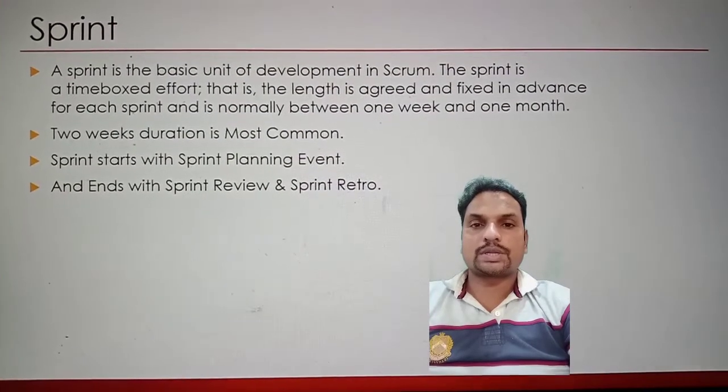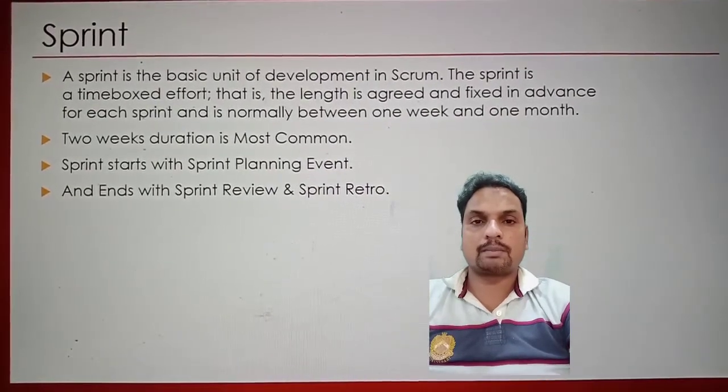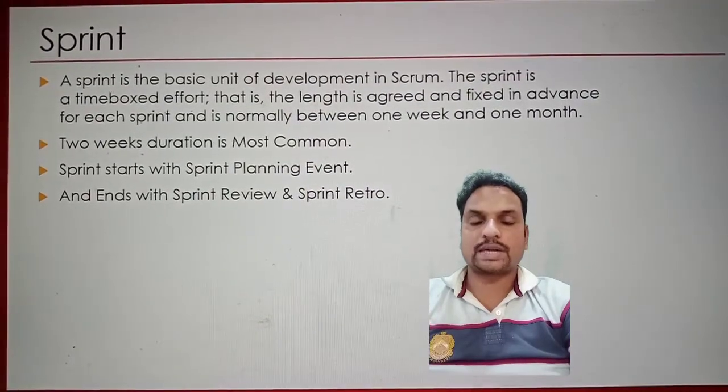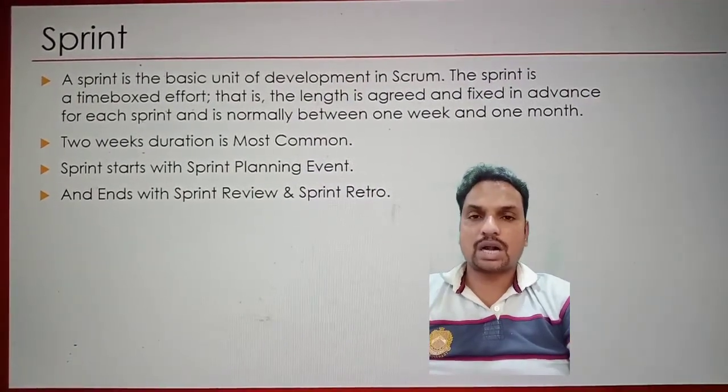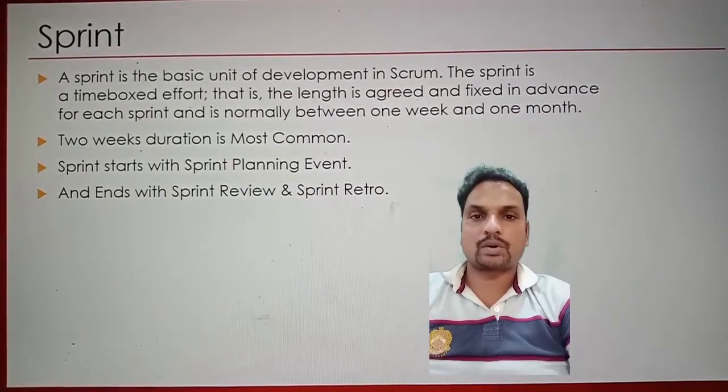The next important question is, what is a sprint? A sprint is the basic unit of development in Scrum. It is time-boxed between 1 week and 4 weeks, that is 1 month, and it starts with sprint planning and ends with sprint review and sprint retro.